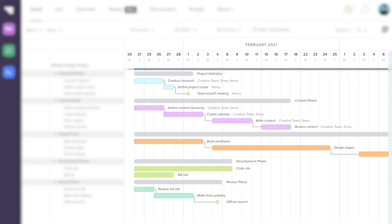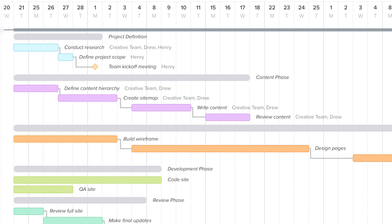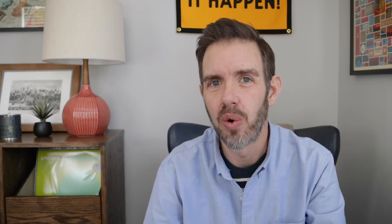So let's talk about how Gantt charts actually work. What you're seeing on screen is a Gantt chart in TeamGantt. It plots time on a horizontal axis as a linear calendar, and we list groups of tasks or phases, tasks, and milestones on the vertical axis — we call that the task list. In the actual Gantt, we represent activities or tasks as bars, and the length of the bar represents the length of the task, shown here in days. You'll also notice the position of the task and how it's connected to other tasks in the list — that connection shows a dependency, which essentially tells us the order in which the work should be done. If you want to learn more of the specific terms and the ins and outs of using a Gantt chart, check out our complete guide to Gantt charts at TeamGantt.com. There's a ton of helpful info there, but at its core, that's pretty much it.